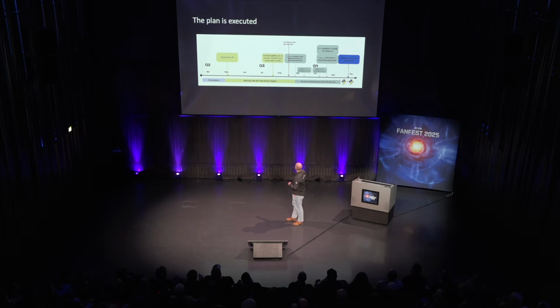One more thing you can see on this plan is the various different milestones that we set ourselves, for the stakeholders in the project to see the progress that we have. Important thing to note here is that we wanted to have the server running first in the Python 3 branch, because the server needs less of the engine components than the client does. We don't need a graphics engine, we don't need the audio engine on the server. We do have a database driver on the server, but that's tiny compared to these other two modules.